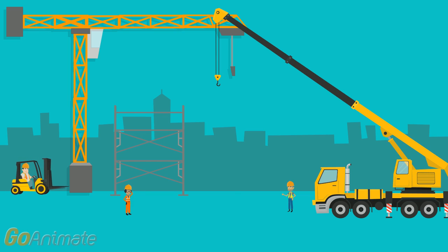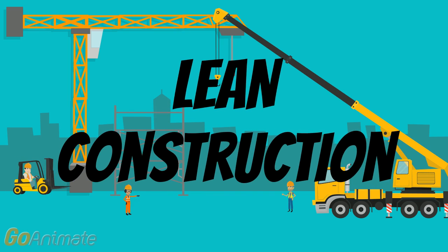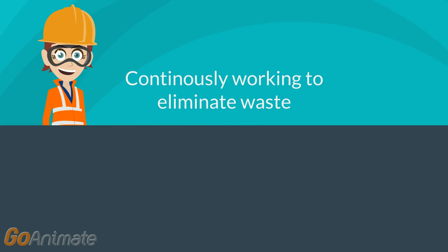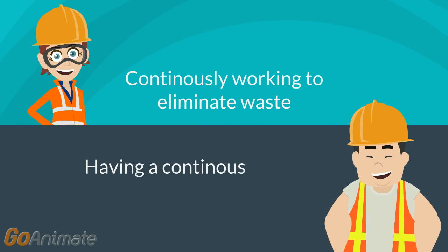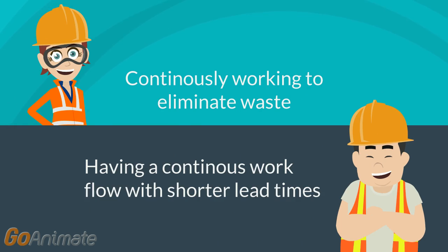Let's talk about our favorite project management tool, Lean Construction. Lean Construction is pillared by two major concepts. The first being that all parties involved will continuously work to get rid of all forms of waste. The second being that a continuous workflow will lead to shorter lead times. This means a shorter cycle time.